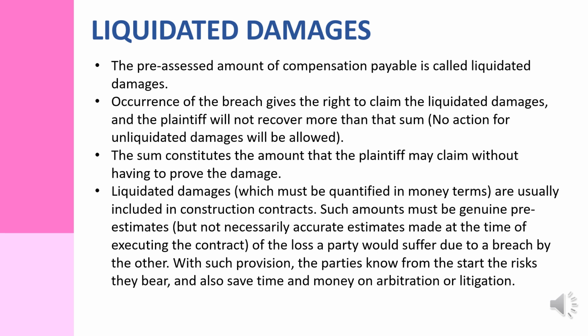Liquidated damages, which must be quantified in money terms, are usually included in construction contracts. Such amount must be a genuine pre-estimate, but not necessarily an accurate estimate, made at the time of executing the contract, of the loss a party would suffer due to a breach by the other. With such a provision, the parties know from the start the risk they bear and also save time and money on